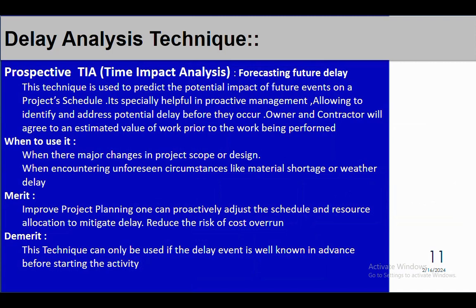So prospective time impact analysis, or you can say forecasting future delays. This technique is used to predict the potential impact of future events on a project schedule. It is especially helpful in proactive management, allowing you to identify and address the potential delay before it occurs. Owner and contractor will agree to the estimated value of work prior to the work being performed. So in such delay techniques, you know the delays well in advance. Before actually executing such activities, you know the delay, and you can make a proactive mitigation plan to overcome such delay and to complete the project on time.